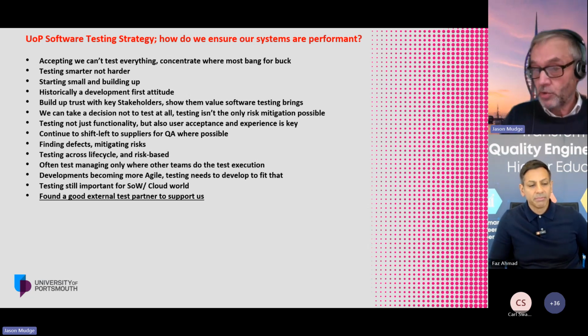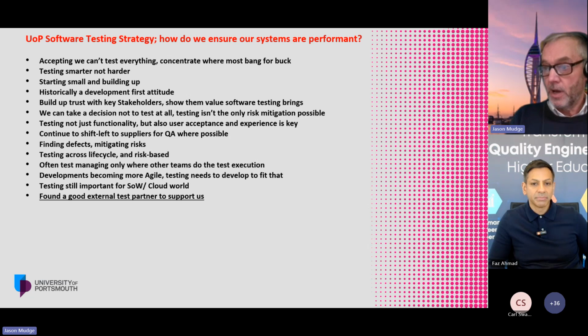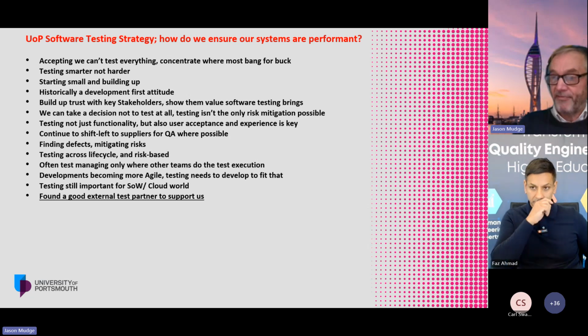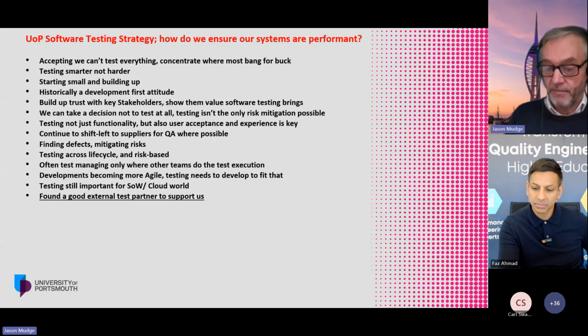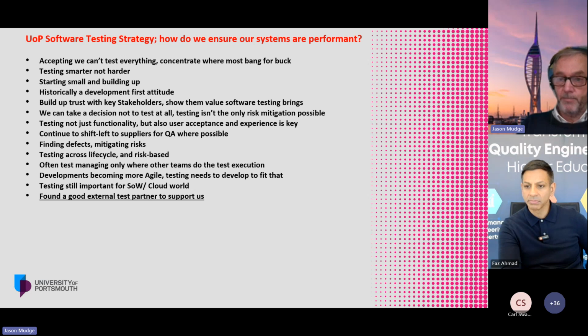If you haven't got test automation at the heart of that, then the testing becomes really difficult and really unwieldy. You find you start getting regression problems, because the effort to keep testing core functionality again and again, release by release, really does need specialist tools. And so we've really put some investment into that.